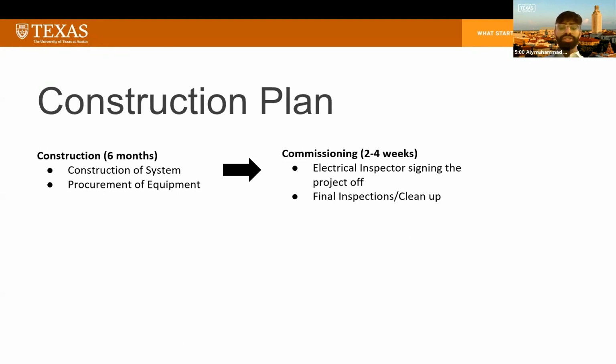Now, during the pre-construction phase of the project, we plan to engage with the community and university by maintaining open lines of communication and holding meetings and drop-in events for them to voice their concerns. During the construction phase, we plan on starting construction later in the morning, not to disturb university residents, as well as updating the university with regular updates regarding road closures. Additionally, we plan to have the construction team use local amenities such as hotels and restaurants to benefit the local residents. After construction is finished, the system will be operated and maintained. The system will have to be operated and maintained, and this possesses another opportunity for community engagement.